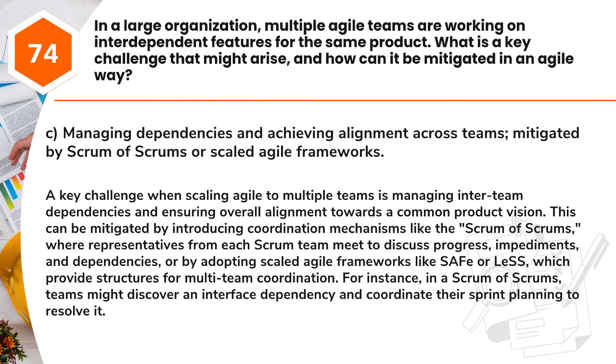structures for multi-team coordination. For instance, in a Scrum of Scrums, teams might discover an interface dependency and coordinate their sprint planning to resolve it.